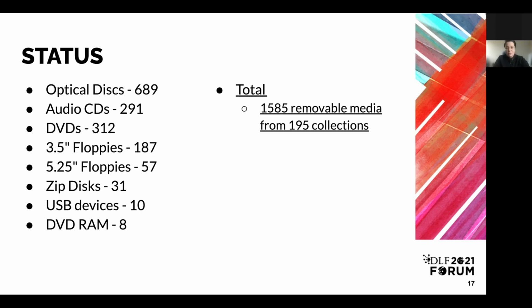This is significantly less than Hyeeyoung's original estimate of roughly 4,500 removable media across 243 collections because there were a large number of duplicate records, or there were records where no removable media were actually found. Finally, records were excluded to prevent the project's scope from creeping.